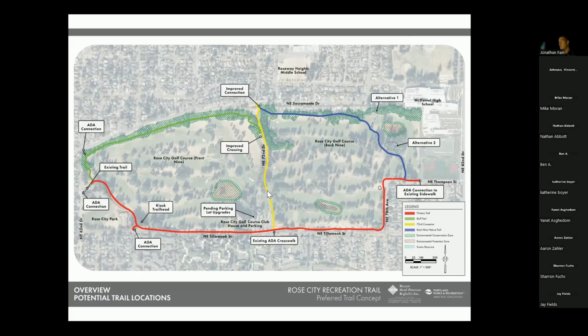The yellow path would be about 15 to 20% of our construction budget. And the blue trail would run from about 12 to 20% of our construction budget. And that leaves wiggle room for adding those amenities like seating and trail mapping and signage and a kiosk area, and perhaps some split rail fencing to kind of guide those folks throughout the space. So that's kind of the cost ranges that we have at this point.